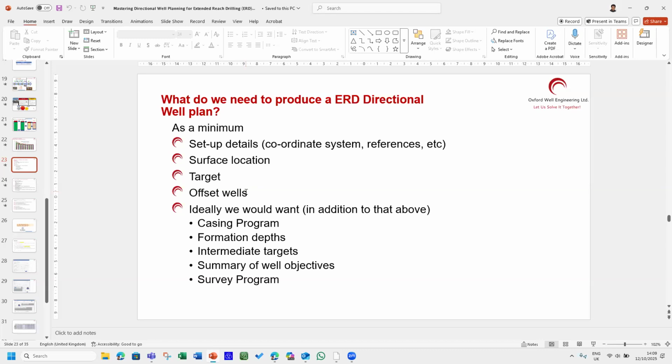And the last one is, okay, I agreed on the last one. Let's define it. Define means define phase or detailed analysis phase in the drilling project management. You will sit down with the plan, do all kinds of very detailed analyses, casing wear and everything, what kind of mud and all the stuff. So that is the principal plan. The very last plan is the principal plan.